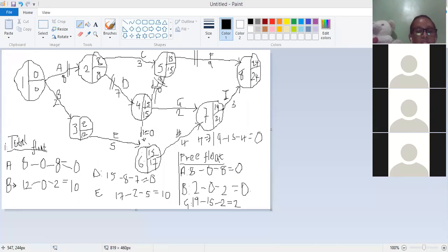This is 19, 0. And you can see H is not critical. By definition, it is an uncritical activity, but the free float has turned out to be 0. So those are the 3 cases that may arise in the case of an uncritical activity. For this diagram, I don't see a negative free float for an activity. But if it happens to be there, we have said you assume it is equivalent to 0. So if we have understood how to go about the free float, now allow me to introduce the independent float.